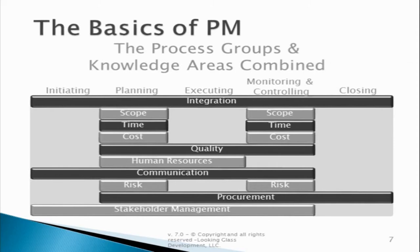Be very careful in reading this diagram — this is not a linear diagram denoting time. It is not arguing that the first thing on every project is initiating, then planning, executing, monitoring and controlling, and finally closing in a neat linear lock step. In fact, nothing could be further from the truth. Monitoring and controlling is an ongoing process that happens throughout the entire life of the project, and that means risk is also being managed throughout the entire life of the project — a very important notion.